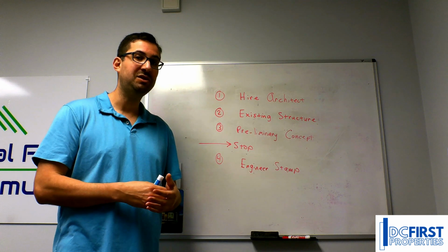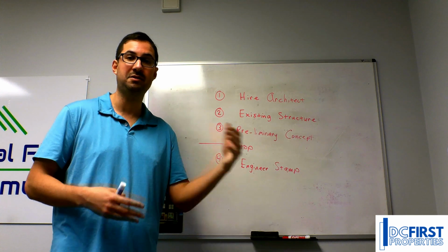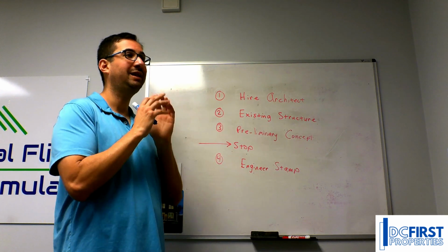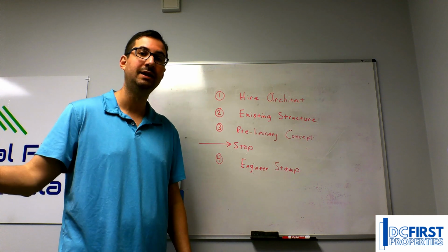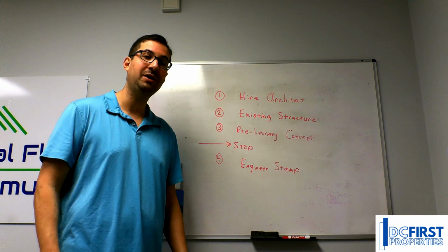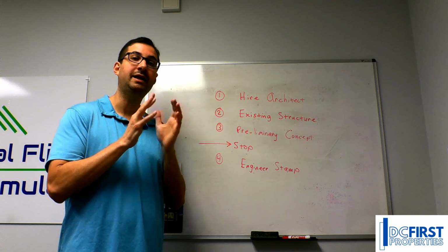The biggest mistake that we see daily is people overbuilding or putting the wrong product in a certain neighborhood. So if you're trying to get a 5,500 square foot house in a neighborhood that typically supports 2,500, you're probably going to be hurting or upside down on that property for a long time. So find a concept that fits the neighborhood.